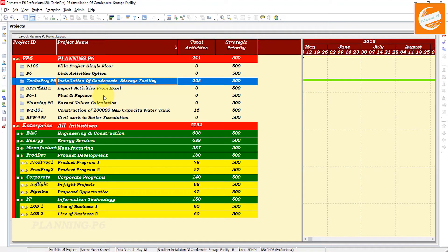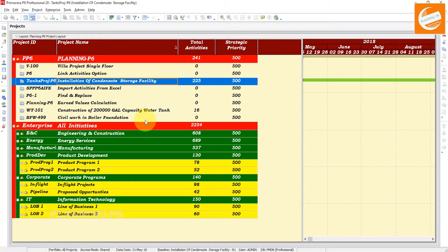These are the enterprise project structure and you can manage by the enterprise project structure, but you have another option to show specific projects in portfolios. For example, if you have infrastructure projects, you can create separate portfolios for oil and gas, power, and energy. You can segregate all sections like that, or manage by client, or by department if you have a departmental schedule. You can share that portfolio with any organization, clients, or colleagues.